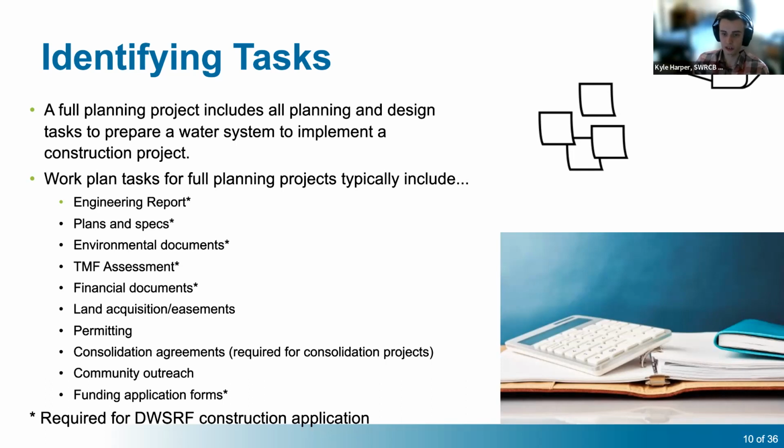I will just briefly touch on the drinking water SRF construction application required tasks, which are the engineering report, plans and specs, environmental documents, financial documents, and consolidation agreements if the project is a consolidation project. And we also need the actual funding application forms as well. And now we can jump into each of those a little bit more in depth.